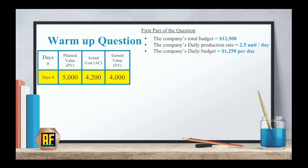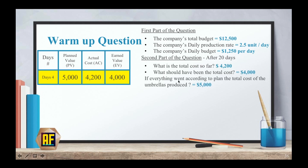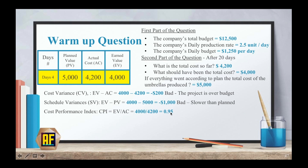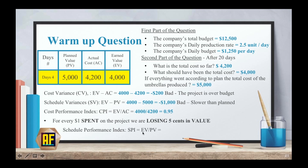Let's start answering the questions from the first video. The cost variance, CV, is EV minus AC, which equals negative $200, meaning the project is over budget by $200. The schedule variance, SV, is EV minus PV, which equals negative $1,000, meaning we are going slower than planned. The cost performance index, CPI, is EV over AC, which equals 0.95, meaning for every dollar spent we are losing $0.05 in value. The schedule performance index, SPI, is EV over PV, which equals 0.8, meaning the project is going at a pace 20% slower than originally planned.